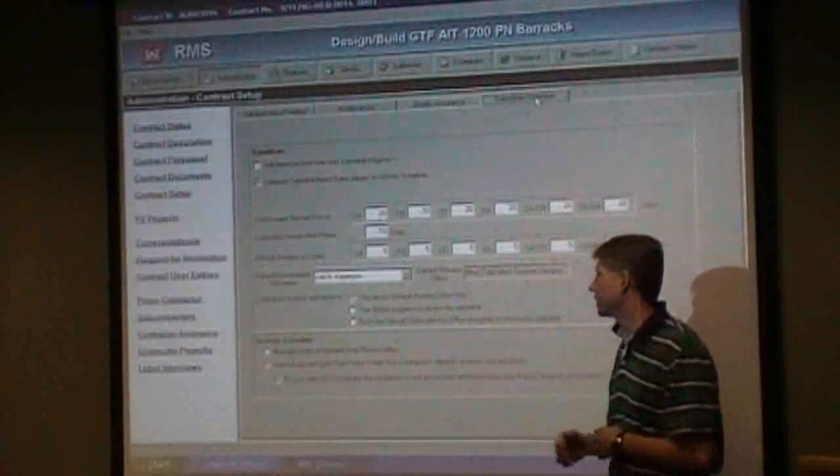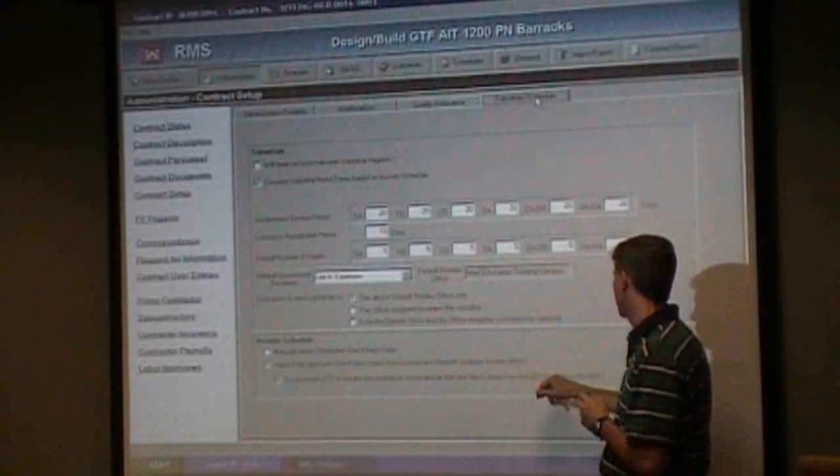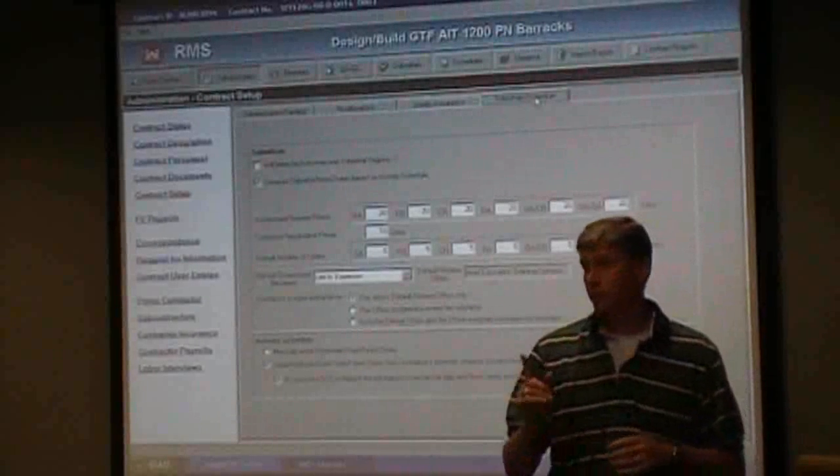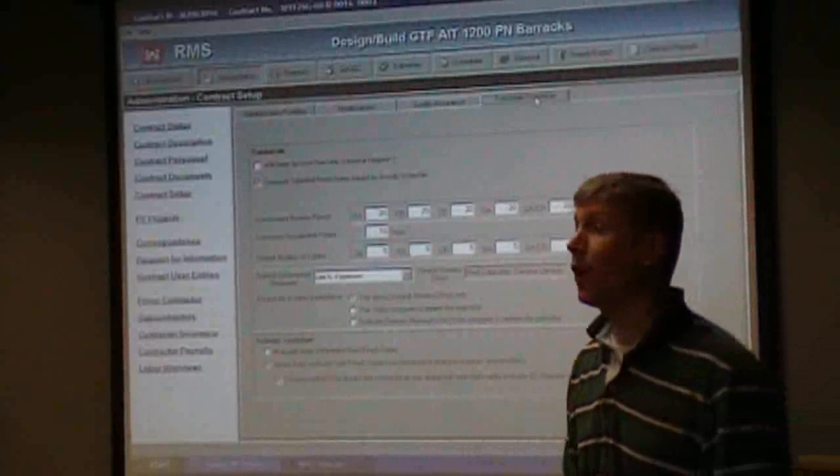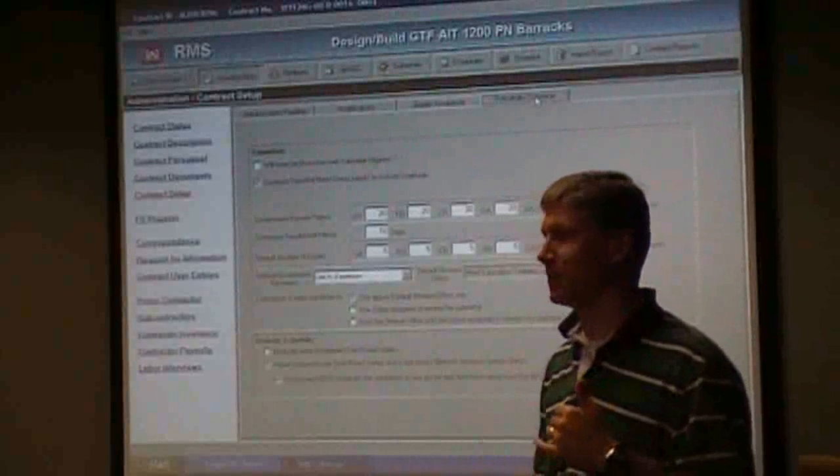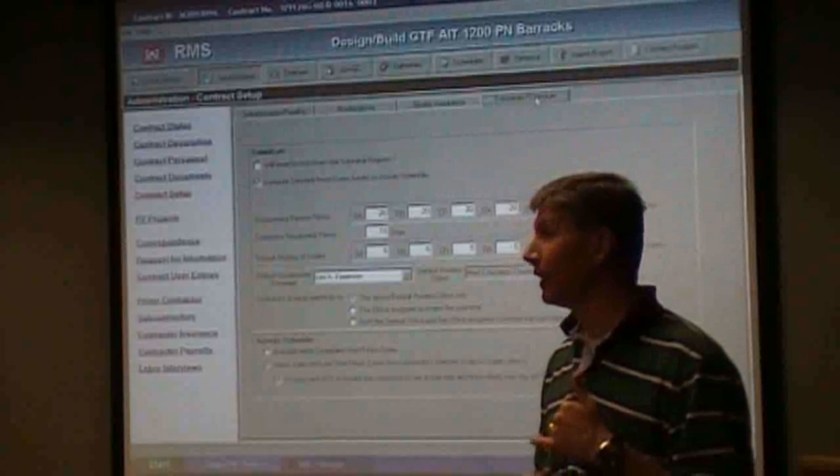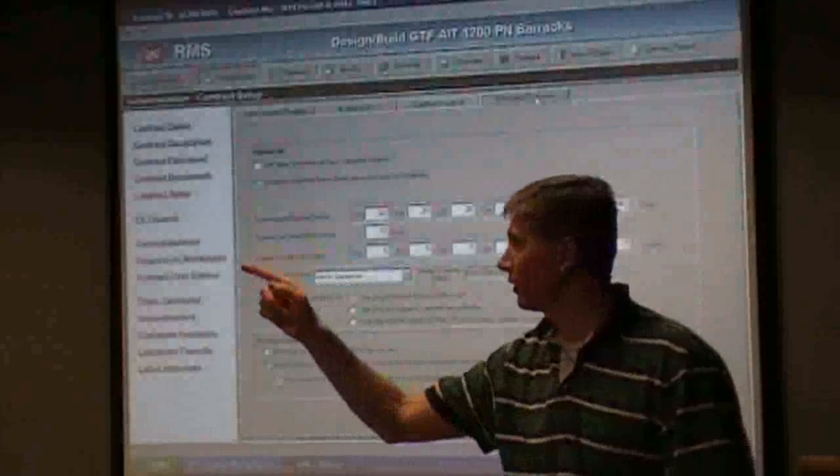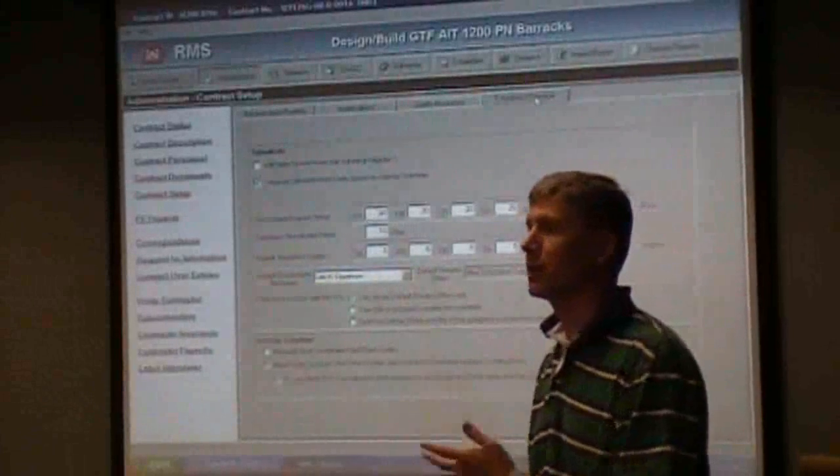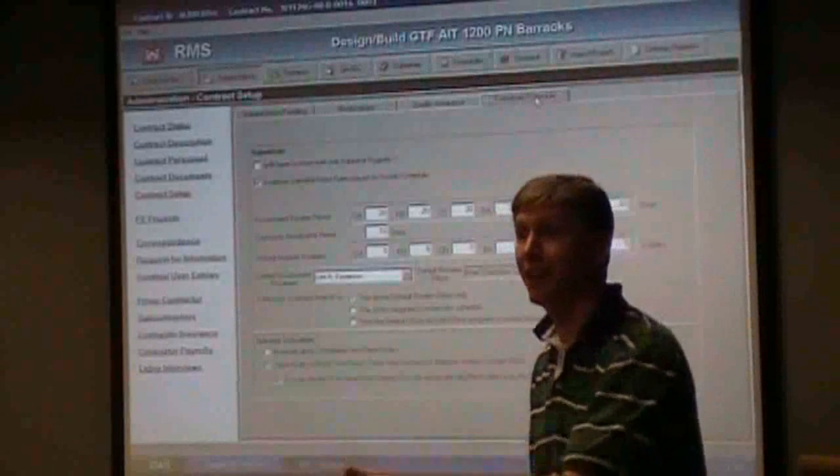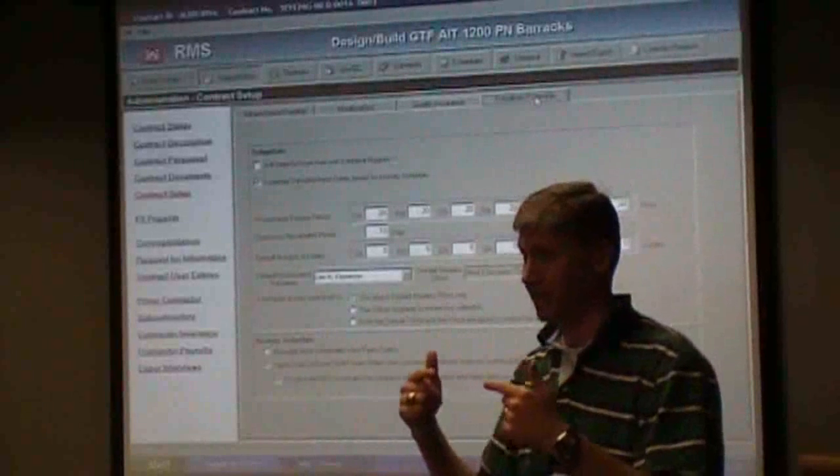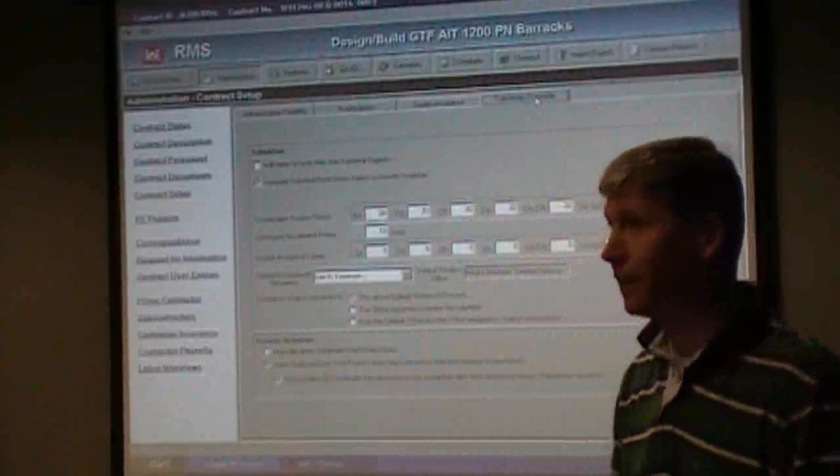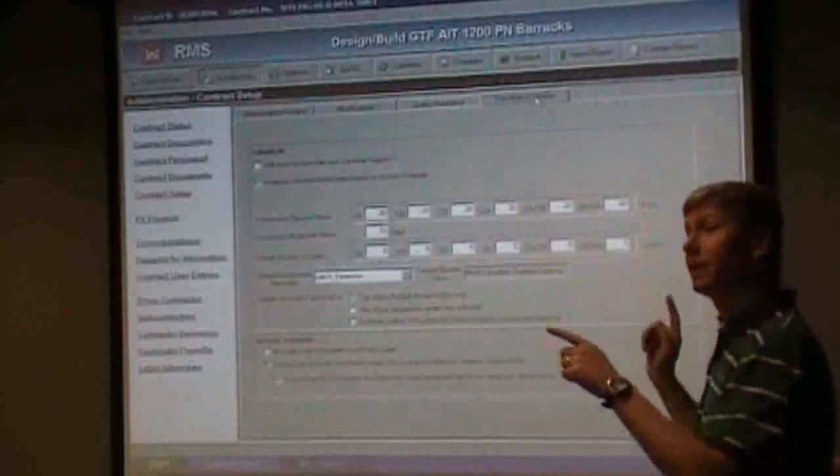Now, you see this next button down here. Do you want QCS to require the contractor to use actual start and finish dates on the QC reports on NAS? That's a new feature, and I really like this one because, and I had HP actually called me. I think it was this contract, too. They were like, dude, what happened? I can't do my payout. It says I got all these dates that are wrong. I said, yeah, you know, your problem is your QC logged in and said this activity started on this day and it finished on this day. And then your superintendent and your project manager went in a vacuum over there and decided what days these activities started and finished and proposed that to our guys. We don't go back and validate that, but guess what? Now the system checks it. And it won't let them do a payout until they get it right.